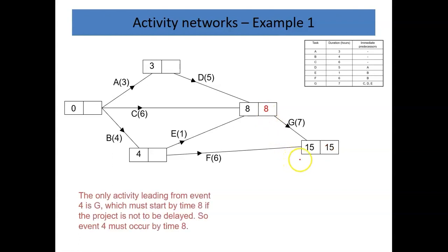And you'll notice there it is. And I can do it this way as well. I can say 15 take away the 6 is 9. Oh, I've got to be a bit careful. I've got 2 numbers coming in. So I've got 8 take away the 1 as well. So again, we're working backwards down here and we're working down here. I've got 2 options. It's 8 take away 1, which is 7, and 15 take away 6 is 9.